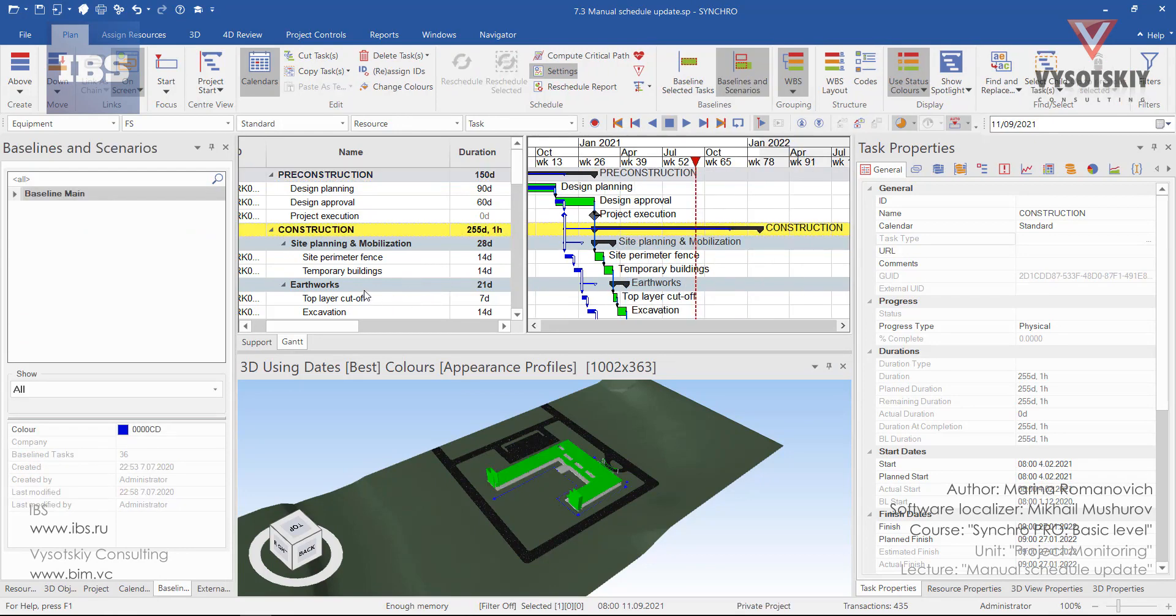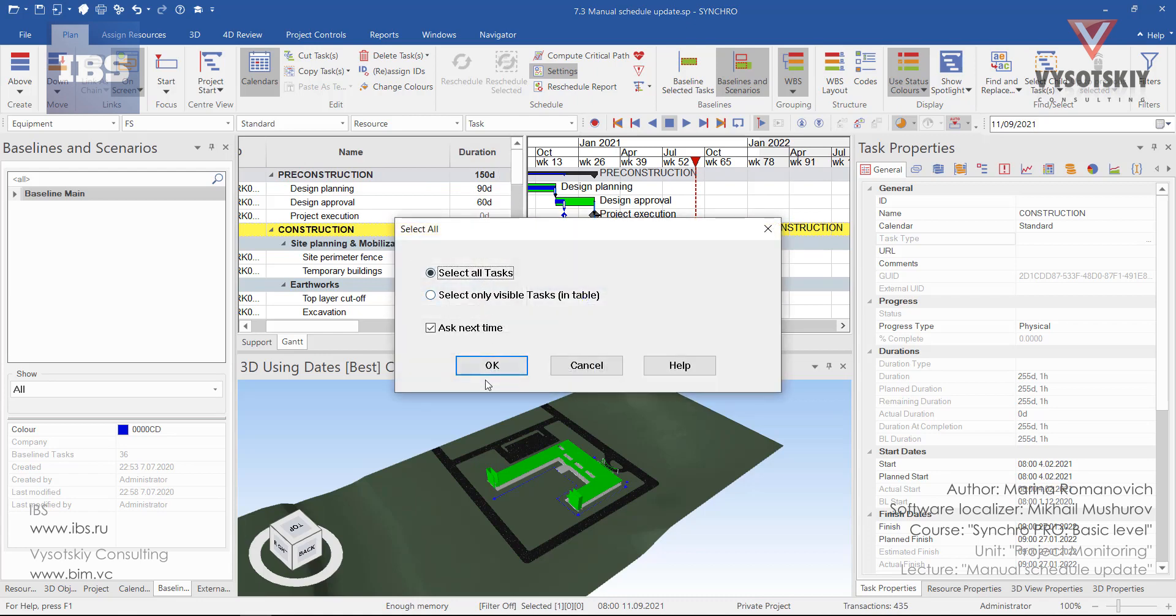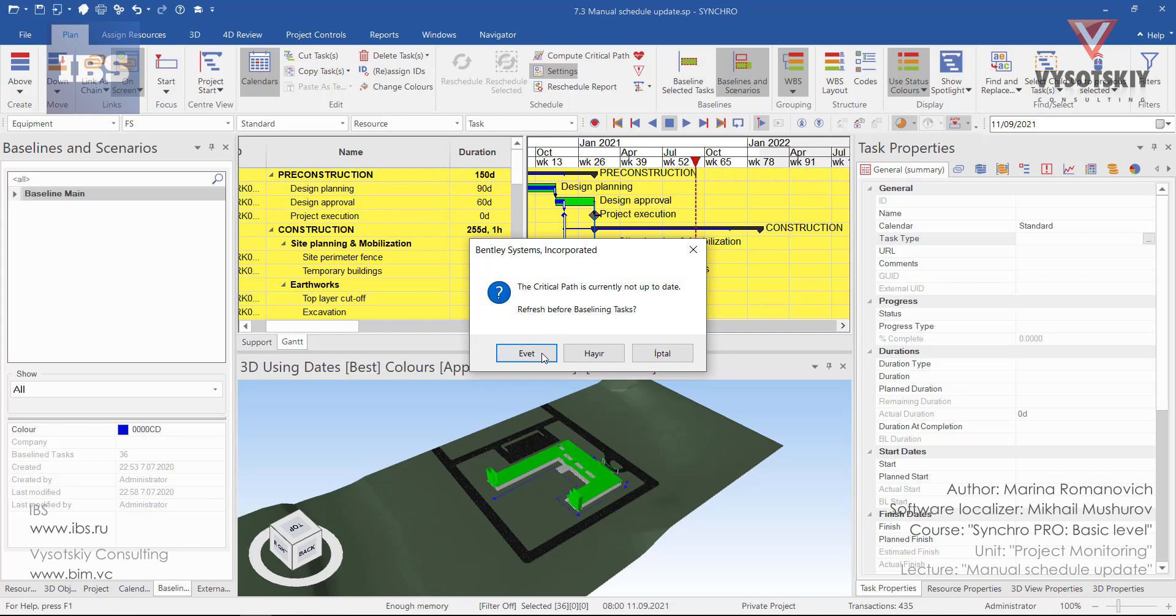And again, before we start making any changes in this graph, let's select all tasks and baseline them. Under the plan, click or baseline selected tasks.